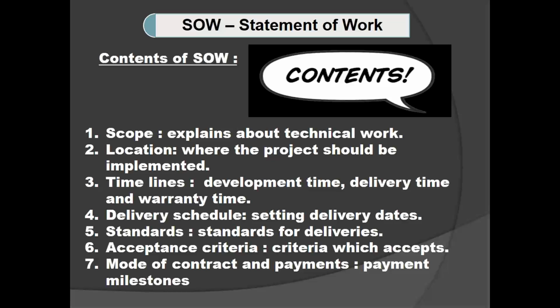If you use 10 resources also, 100 resources also, the only thing he is bothered about is whether you are going to complete the project within the given timelines and budget or not. So that is nothing but fixed bid.